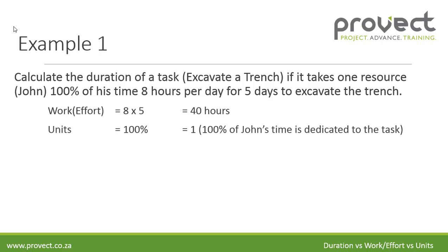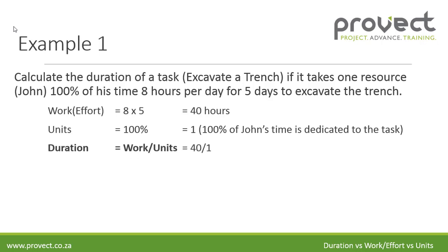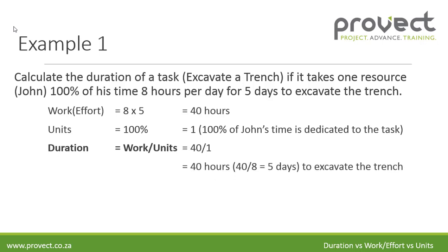The unit, which is the percentage, is 100% which equals one. The duration is work divided by units: 40 divided by one equals 40 hours. Forty hours divided by eight hours per day is five days. So it will take John, if he spends 100% of his time, five days to excavate the trench.